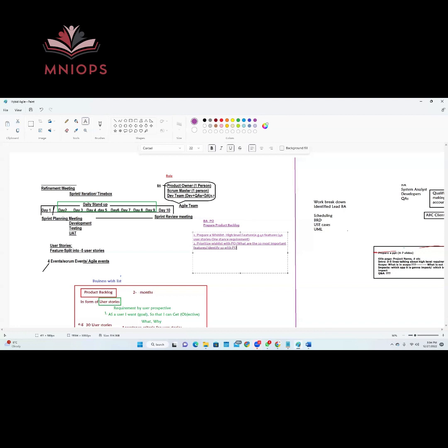Right? And once those 10 are identified, then the third step is to work with the PO to break down those capabilities into features and then into unit level functionality in user stories.